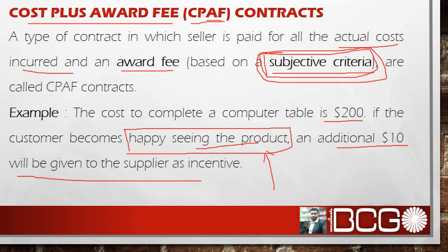So it is a subjective criteria, and do remember these criteria are not subject to the court. You cannot claim the award fee in the court.